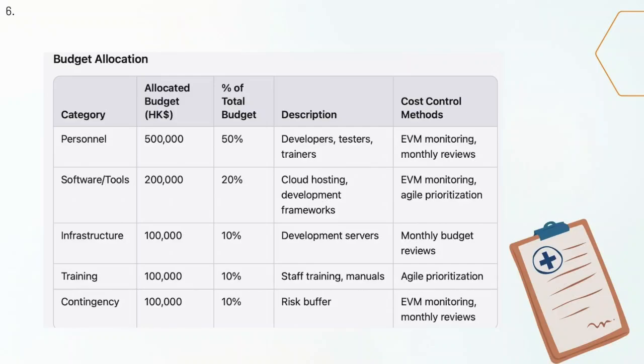Software, tools, materials, and infrastructure costs ensure the computing and storage needs of project development. Training costs are also a part of the expenditure, which ensures employees' acceptance and proficiency in using the new system and makes the system landing smooth. 10% of the budget is reserved as contingency for unexpected project situations.